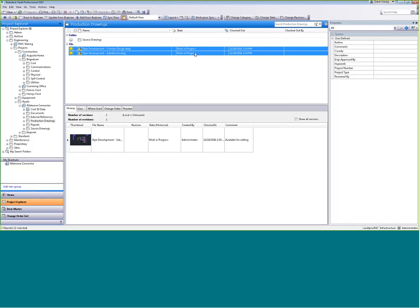The state will actually affect the behavior of the drawings. While a drawing is work-in-progress, you might not want an admin assistant to be able to see and copy these to send to a client. You can set it up so only designers have the ability to see these files while they're work-in-progress. When they go to 'for review,' designers and project managers can see them. Finally, when they're 'for construction,' everybody in the organization can see them. You can set rules to do all sorts of different things.